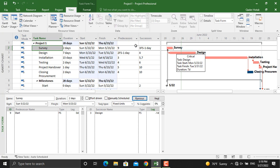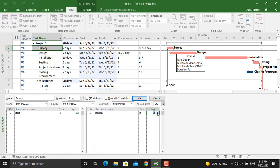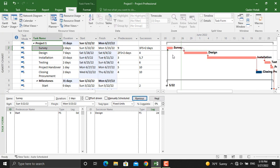And as you can see the relationship with the successors, its successor is the third activity and the relation type is finish to start and minus one day, it has a one day lead. If we increase it for example to two days, click OK, there will be a gap between these two activities.